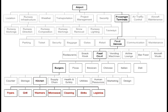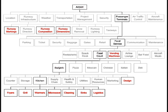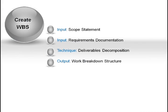We can reach the work package level of decomposition at different levels of our WBS. We don't need to decompose the vending machines deliverable further to understand the activities for achieving it, same for runway material composition or runway dimensions. Everything at a work package level has no additional level of decomposition — there will be a line coming in the top but none going out the bottom. When we finish using the deliverables decomposition technique, we have the first of our four output items: the work breakdown structure.